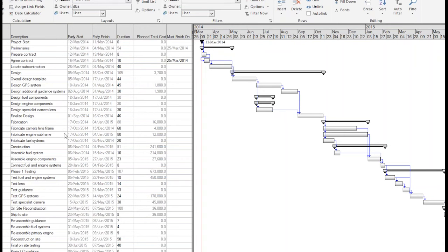Another interesting thing that happened when we opened the schedule, and one of the most important things about any schedule risk analysis, is of course the schedule itself and the quality of that schedule. So constantly, while you're either opening a project or creating a project, in Safran Risk we're monitoring that schedule for any potential issues that may cause problems during a risk analysis. Things like hard constraints are not a good thing when you need a free-flowing schedule.